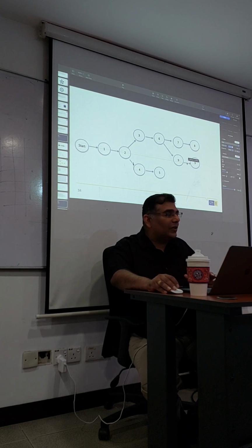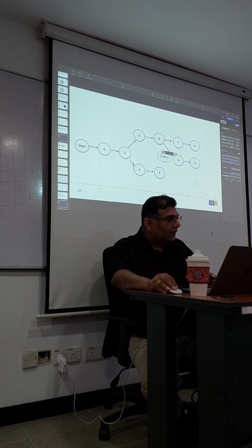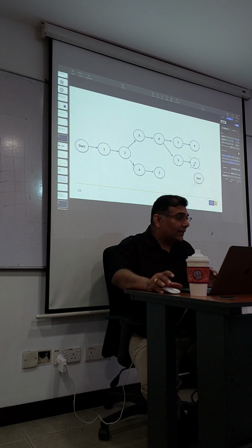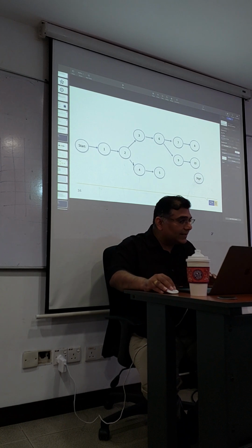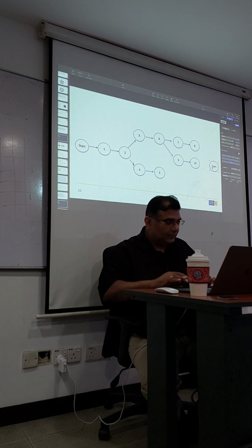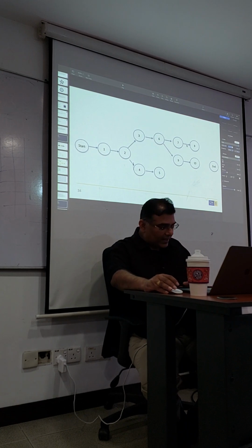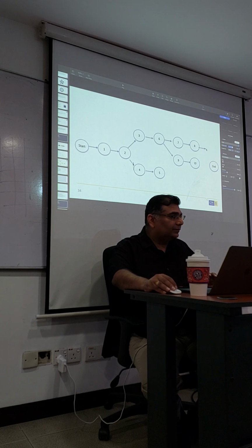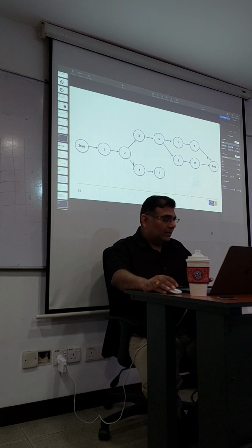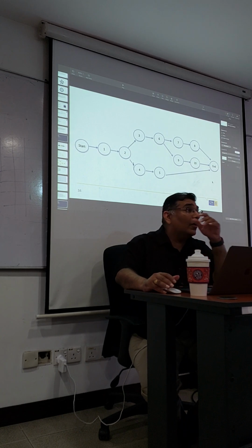Now, the last one you do is the ending, N. You draw a last one called? So, number 10. Oh, this is 10, sorry. The last one is N. And all you do is you take everything, connect the arrow. Connect the arrow down. Always must have an N. Everything comes to the final station called N. Are you okay? Okay, sir. Finally understand. Okay, we are done drawing the whole thing.